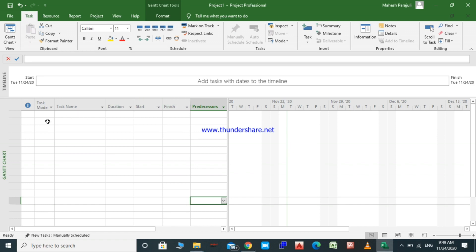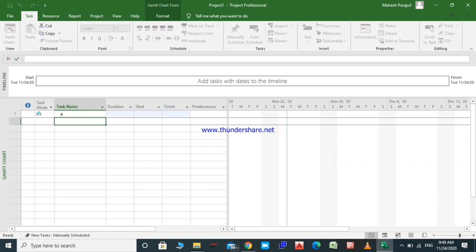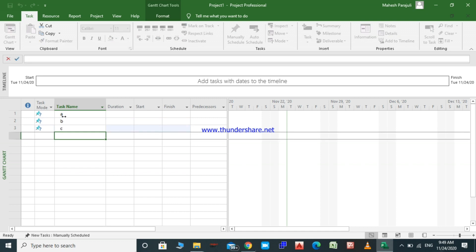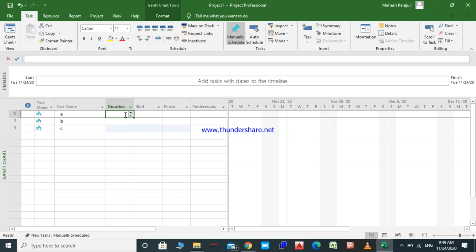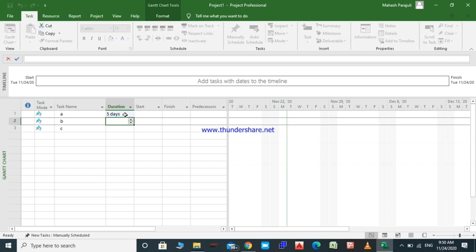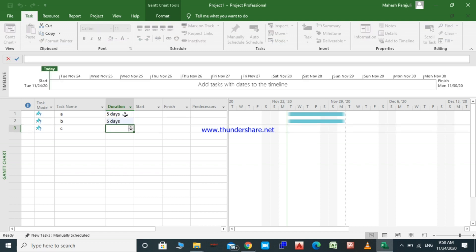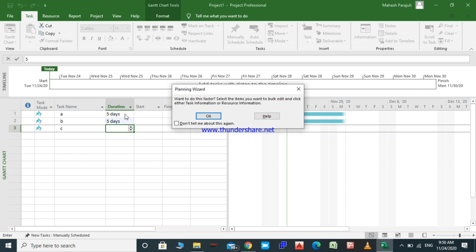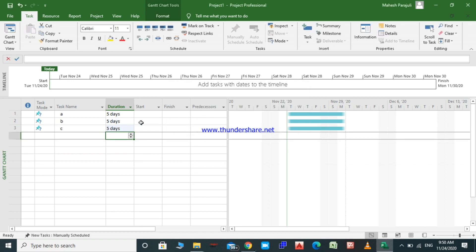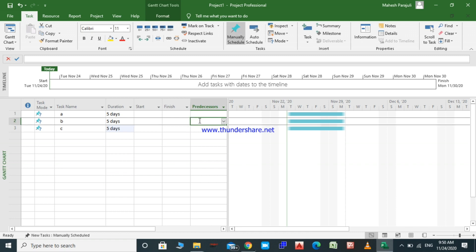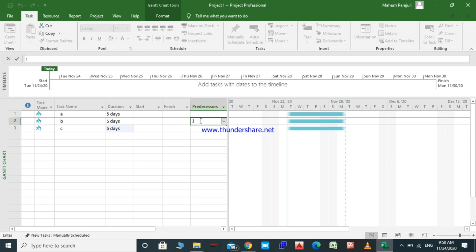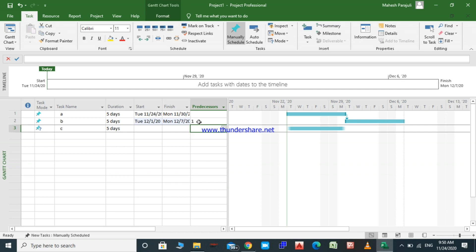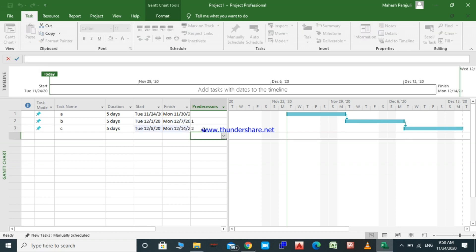In the next lecture we will see how to enter activities and how to link them, but for now, to understand how manually scheduled and auto scheduled settings work, we will put three activities here. Let's say Activity A, Activity B, and Activity C. The duration of each activity is five days. Activity A is the predecessor of B, so I put one in Activity B, and two in Activity C to link them together.